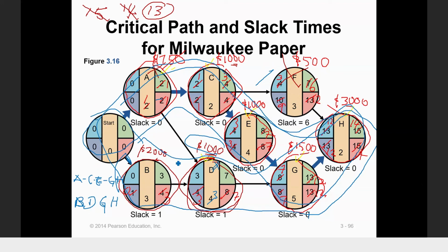Okay, if you reduce this, when you arrive here to calculate H, it doesn't affect. You still have to pick the number that is coming from; when you arrive at G, you have to pick the largest number. So whatever you reduce on D will not affect, because this route will contribute to G. Remember we have to select the maximum number to put here in G.